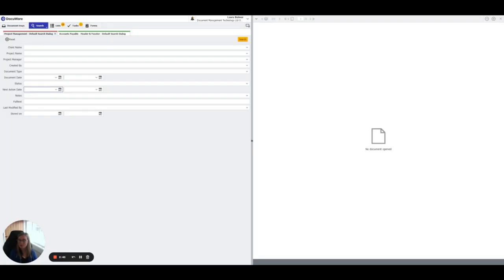In thinking about how you might get yourself prepared for a document management system, I would be thinking about document types, having a really selected predefined list of document types, because if you did set up a document management system like this and you wanted to bring documents in, if you didn't already have that in place, you would then have to go renaming loads of documents, and that's very difficult. So maybe have really set document types, criteria, and maybe even a document register so that everyone knows what the list of document types are and there can be no confusion.